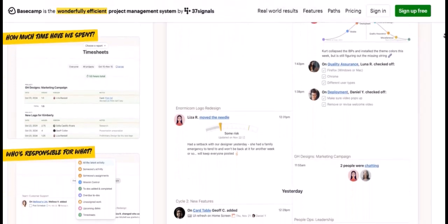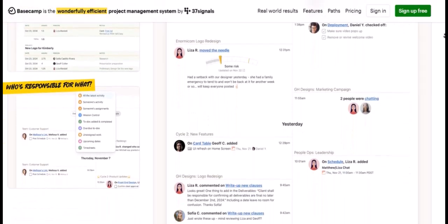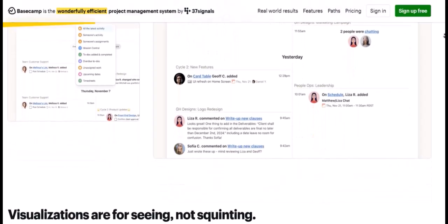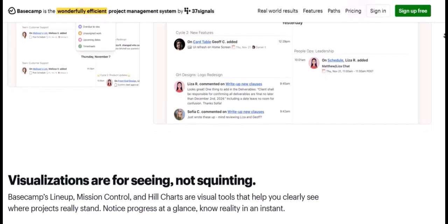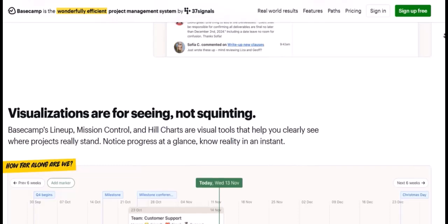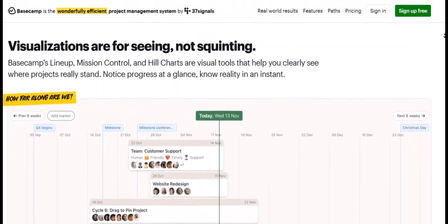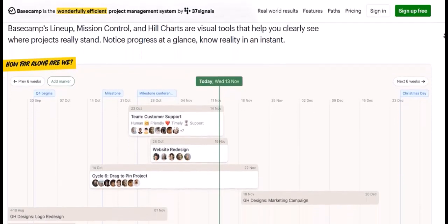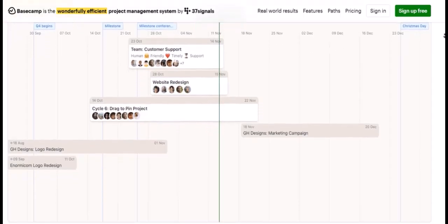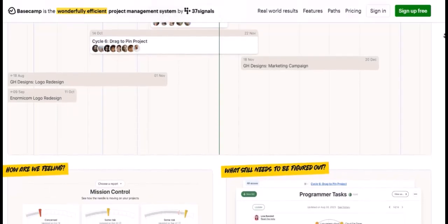To-dos. This is where the actual work gets tracked. To-do lists are the heart of project execution. Tip 2. Use lists for stages or categories. Don't dump all to-dos into one massive list. Instead, create separate to-do lists for different project phases, e.g., planning phase, development sprints, review and QA, or categories of work, e.g., marketing tasks, design deliverables, admin chores. This makes lists manageable and progress easily trackable.